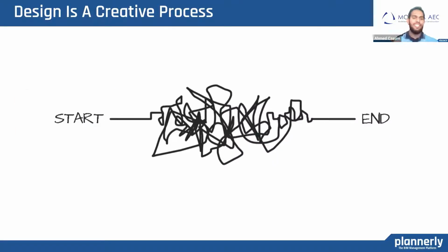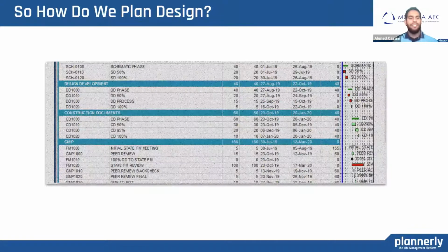The design process is a crazy, intertwining, tangled process that goes in loops that you can't really predict most of the time because of change. And that results in a lot of rework. And so it can be quite a complex process. The problem is the design manager or project manager has put a line in the schedule that says that's DD, design and development. 50% has got to be done by September the 27th and 100% by October the 16th. It's often boiled down just to a single line on a schedule, and it's not very useful to many people.